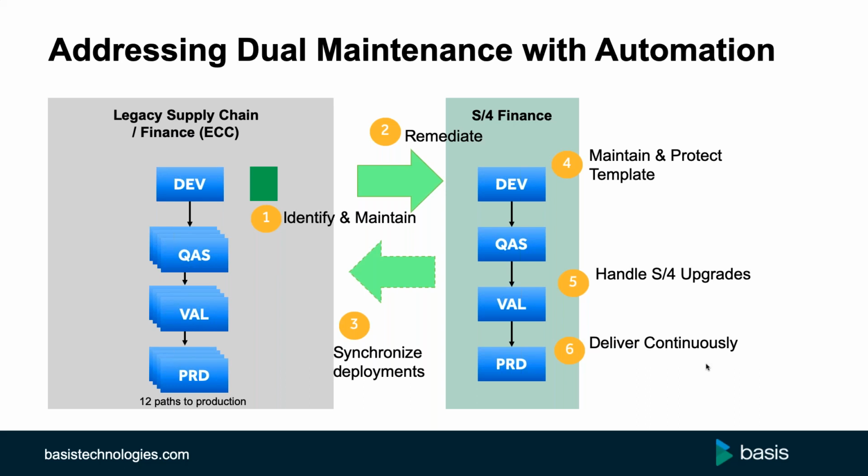So because this ECC landscape represents more than just finance, the first challenge is identifying and understanding which changes on the ECC landscape need to be considered for dual maintenance, because it's not all of those changes, and how can we maintain as many of those as possible in an automated way between the ECC and the S4 development systems.